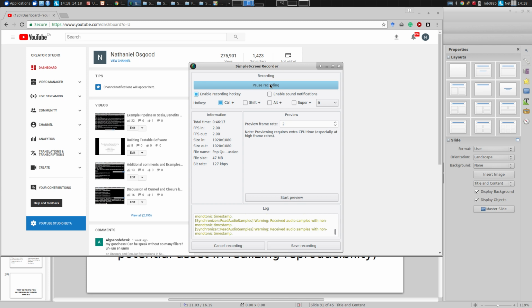But I'd actually say, if I had to pick one of those that's proactive, I'd say mitigation, because it's dealing with the issue up front. You're saying up front, look, this is a risk we got to grapple with. And mitigation is putting in place measures, ladies and gentlemen, so that either the risk that you're worried about has a lower chance of occurring, or, number two, that if it occurs, it has less serious implications.